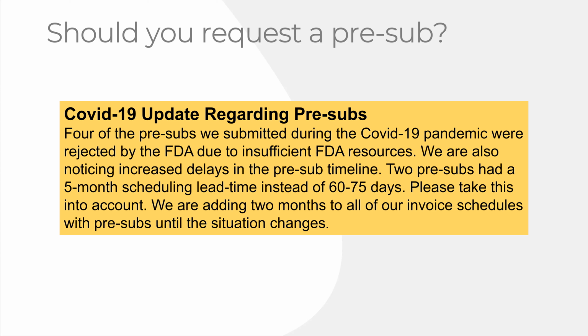So make sure whatever is in your timeline, check each item. Is that real? Is that estimated time that we put down there real? FDA says 60 to 75 days. We find that's really 4 to 5 months. Totally different.